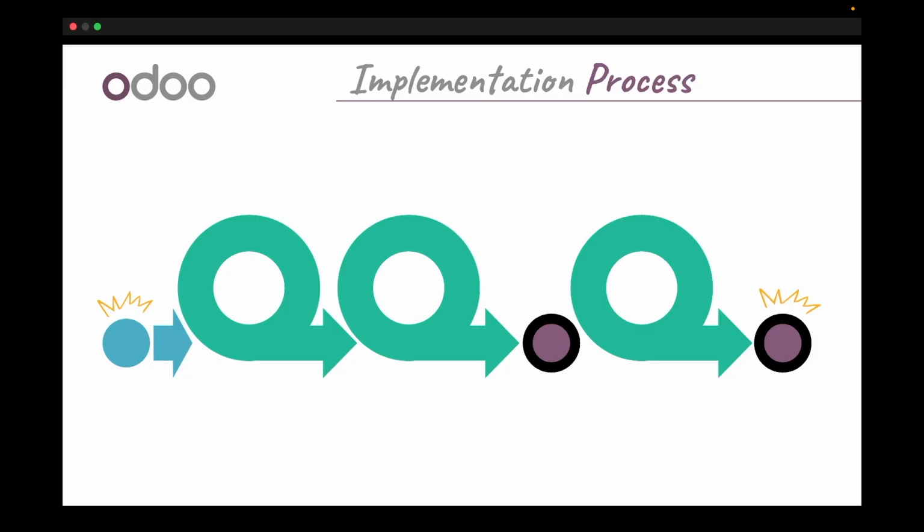Now, this is just a broader spectrum of an entire implementation. You can pay attention here, right? This is what we just looked at. There can be as many of these phases as needed. Just for the slide deck, we have 2. We're going to imagine it's a pretty easy project. The point of this, though, is you have an MVP, then your next phase, like maybe accounting and inventory, and then manufacturing, right?